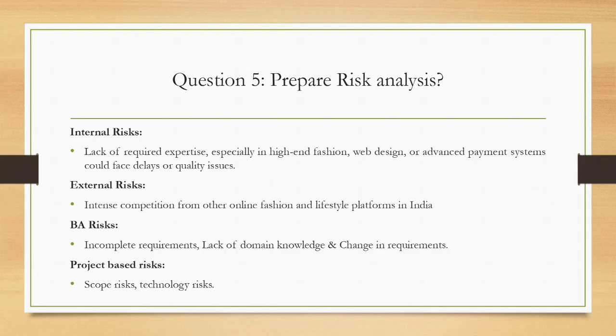Because we do not have the experts, we may face a few delays when developing this application. The subject matter experts will not be available, so the developers' doubts will not be cleared in a good way, and it may slow down the project. And external risk, like intense competition from other online fashion and lifestyle platforms in India.